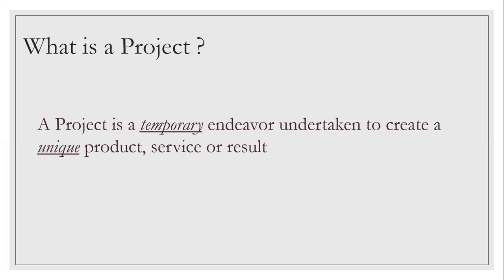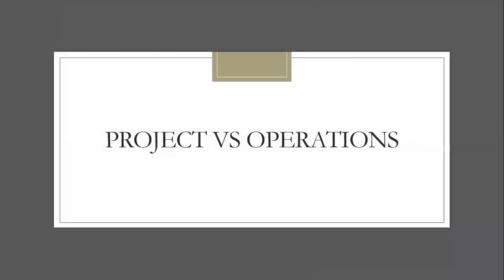Again, will that be considered as a project? Because we now have got an end date, right? But still it will not be considered as a project because though it's got an end date, it's not unique. It's a repetitive behavior which you are doing every day. Day in, day out you go, which is not producing a unique product, service, or result. So that is the main crux of a project. There are many other things if you have to know with the project, but this is the fundamental one, that anything with an end date and which produces a unique product or a service or a result will fall under the purview of project.